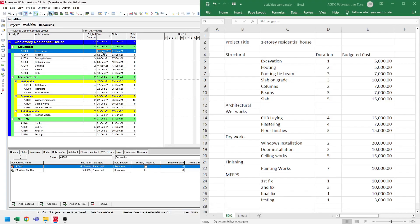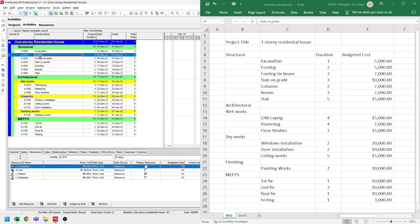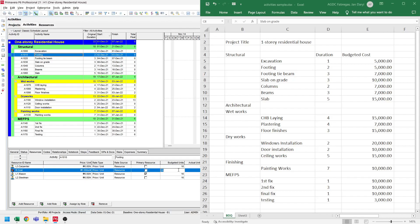On the right, I have the BOQ. For excavation, it costs $5,000. So let's select the excavation activity in the schedule. In the details pane below, select resources. Look for the cost resource we assigned, then set the budgeted units to $5,000. Now for the footing, we have the same scenario. Let's click the footing activity. Based on our BOQ, we have $5,000 cost, so let's select the cost and set the budgeted units to $5,000.